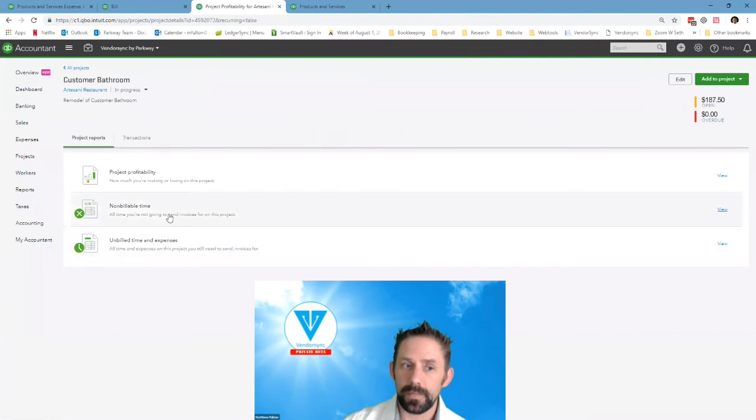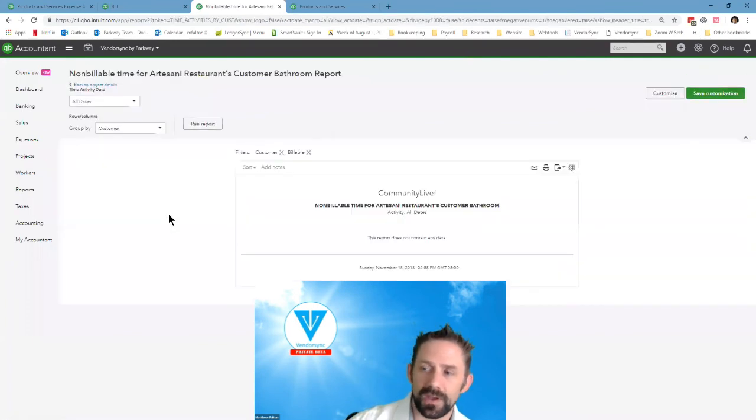Right, because you'd have non-billable time versus billable time. You don't have the ability for non-billable expenses the same way to show up line item wise. It'll still show up on a profit and loss. So the way we set it up is we can actually create individual items for each of the developers, pull them in, create bills for their time, which get turned into invoices. So when the customer pays, we know we can pay the developer as well. Some pretty unique items.